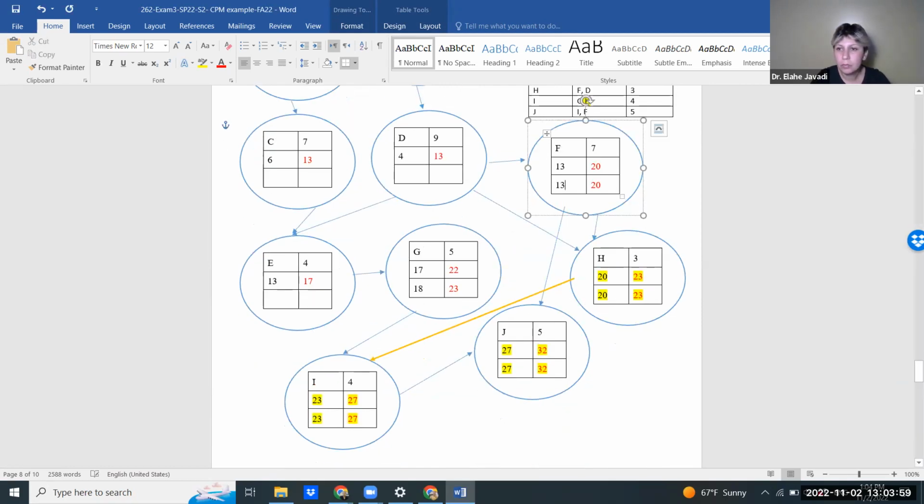Perfect. Thank you. So I see, Greg, you have posted a question. If dependency in a task is blank, you can start it whenever you want. Yes, on day 0. If there is no dependency, it means you can start on day 0. And if it's not critical, it means that you will have a slack and you can potentially start it later, but only if it's not critical. So it's not whenever you want; you start on day 0. If it's not critical, you may have a slack, and that slack gives you flexibility.